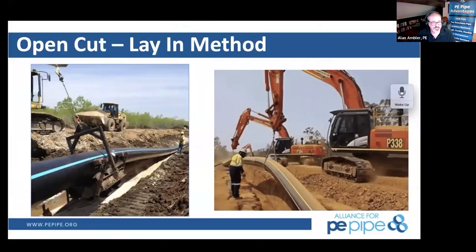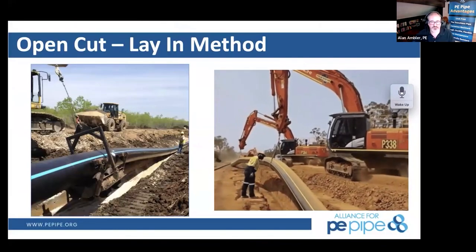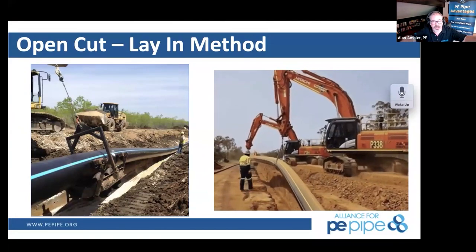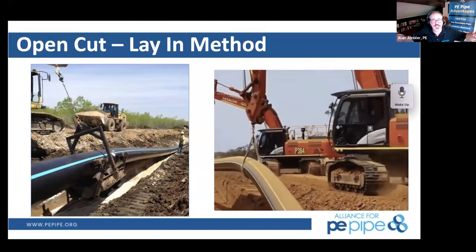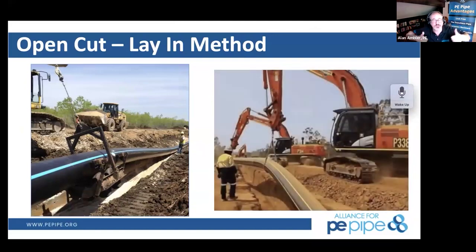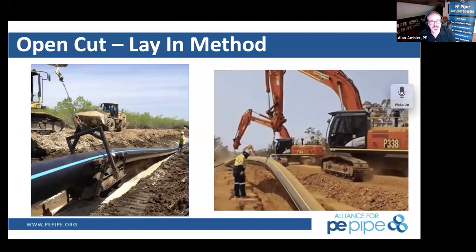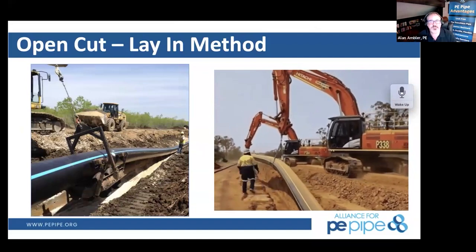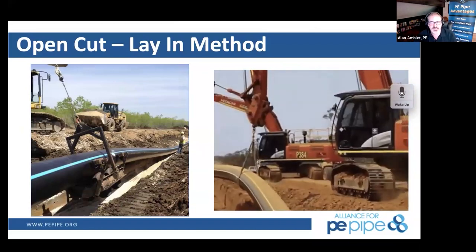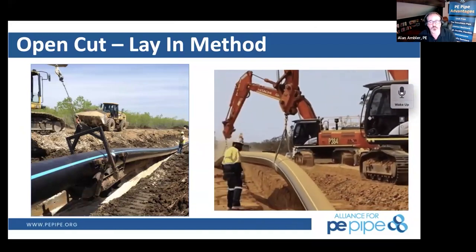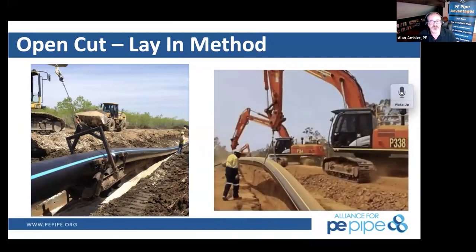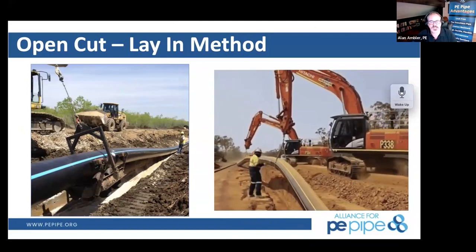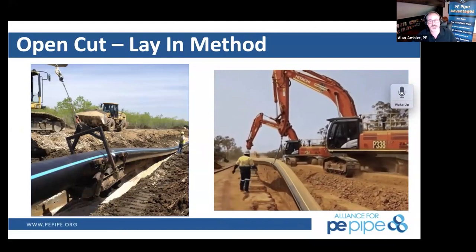Okay, when I mentioned paradigm shift, if we can open up more trench and all of a sudden put that long fused up pipe run already in the longer area, we're going to dramatically increase our productivity. And that just means that that contractor gets paid more because he or she gets paid based on how much pipe they're putting in the ground. So we're going to start to see a paradigm shift for contractors that are aware of the benefit in increased productivity of a long fused run, really start to take advantage of that for their own needs.